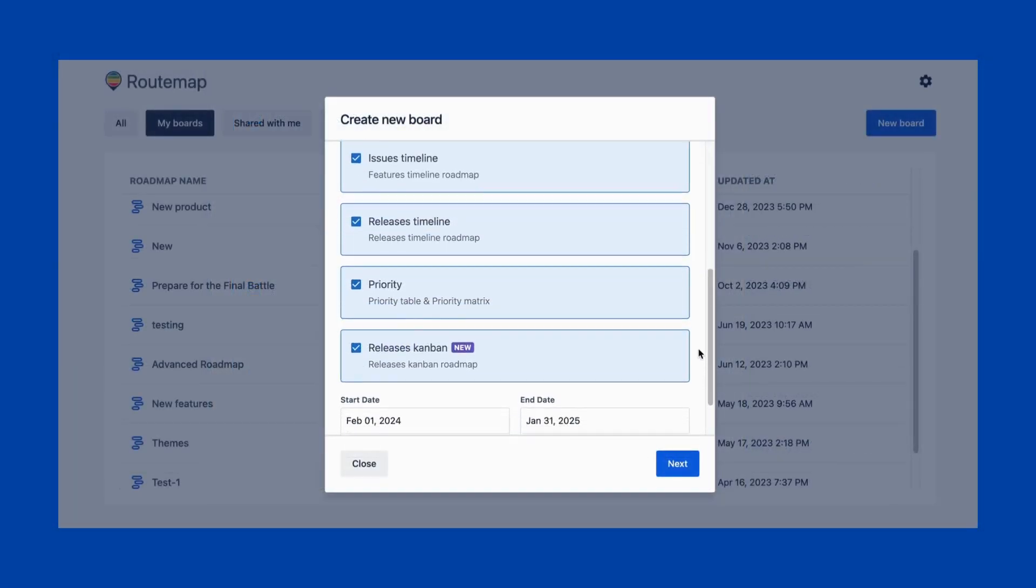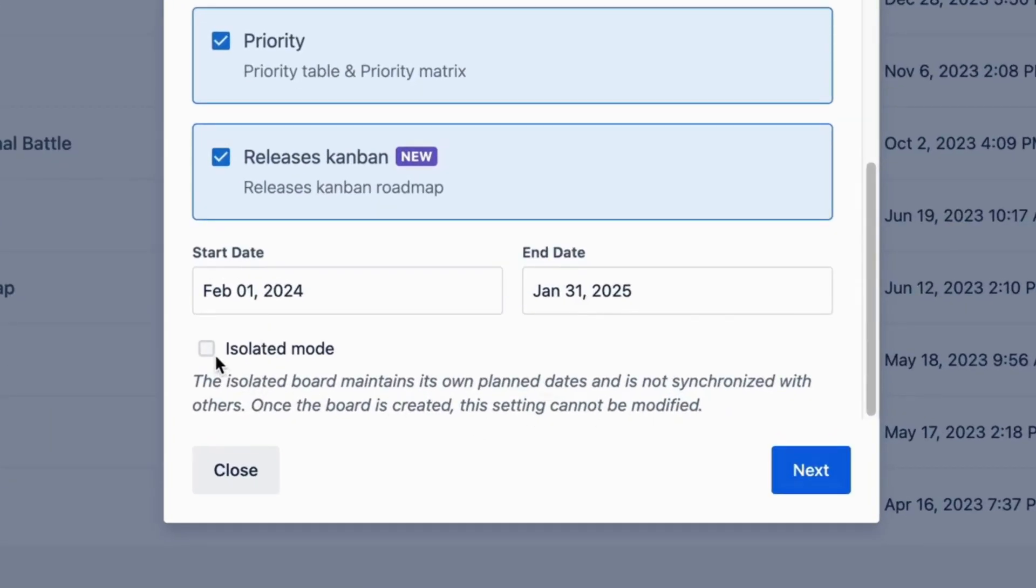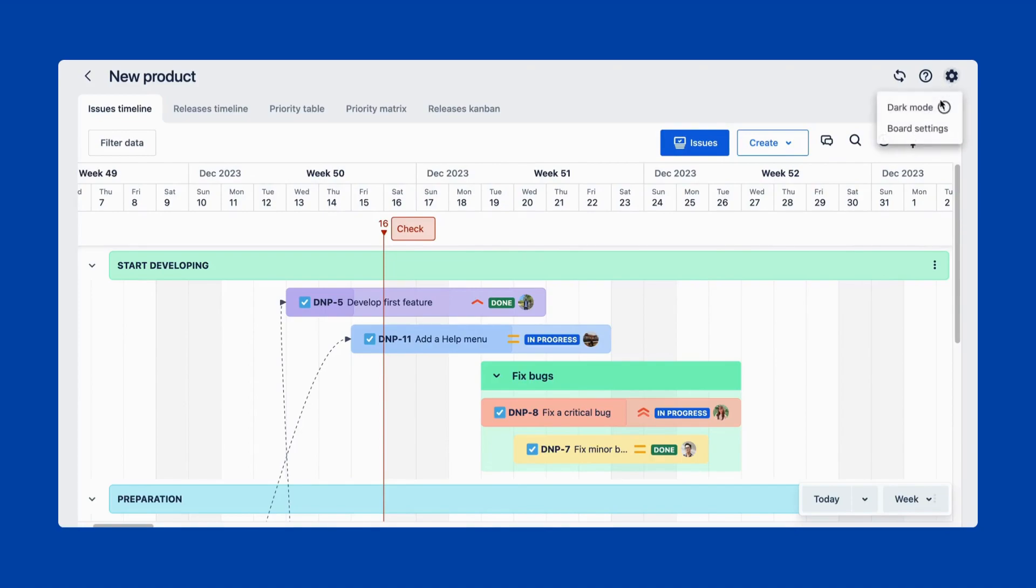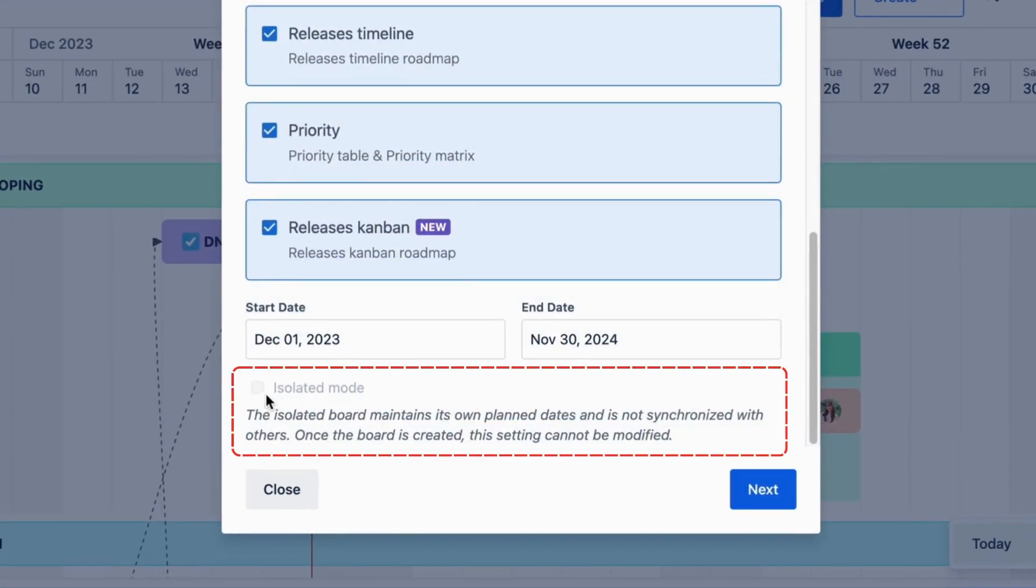Moreover, RouteMap also has a feature called Isolated Mode, to help you create a new board with issues from the same project without affecting the planned dates in other boards. However, keep in mind that this feature cannot be changed after the board has been created.